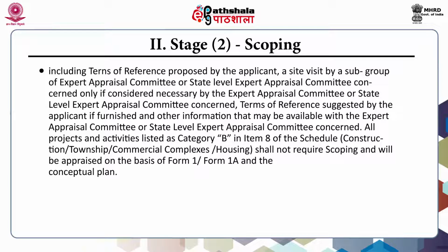All the projects and activities listed in category B in item 8 of the schedule, that is construction, township, commercial complexes, housing, shall not require scoping and will be appraised on the basis of Form 1 or Form 1A and the conceptual plan.